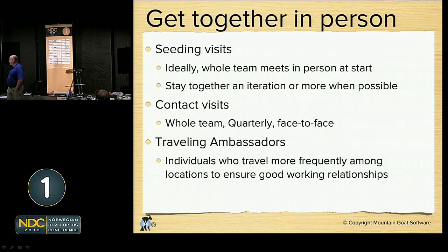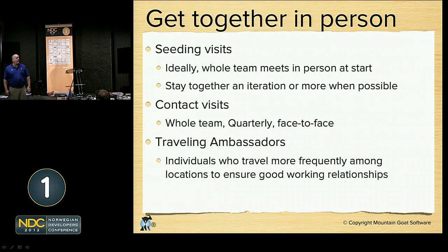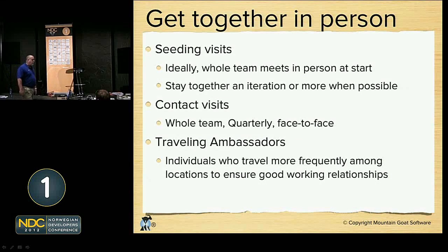Now, there's a couple of times that we can do this. The first is what is called a seeding visit. A seeding visit is where we try to get the whole team or a large portion of the team together at the beginning of a project. One of my favorite teams that did this had some of the team here, some in Amsterdam, and then part of the team in Bangalore. And the team in Bangalore would go live in Amsterdam. Part of the team would go live there for, I think, 2 months at a time.